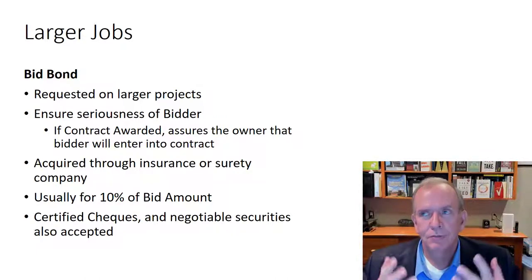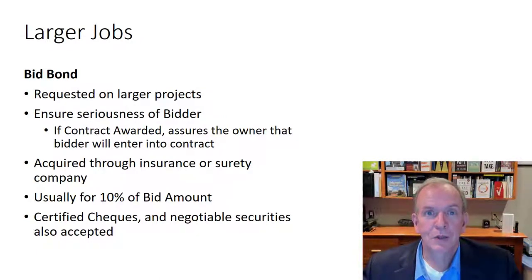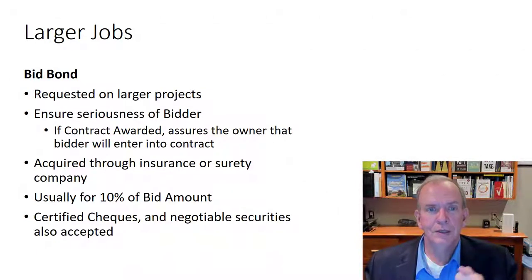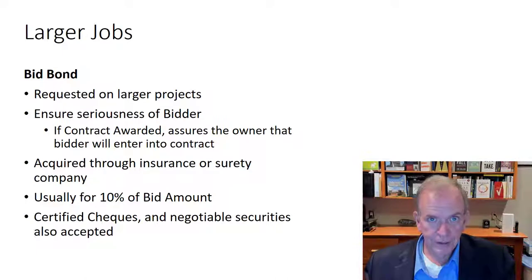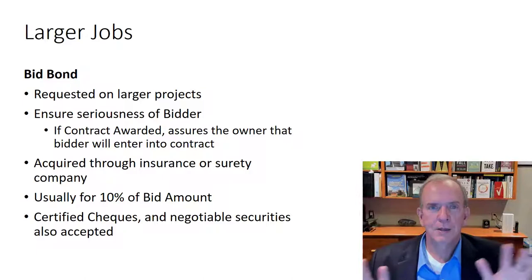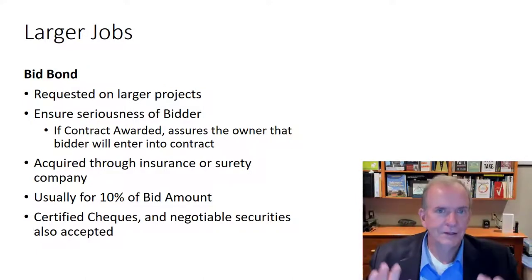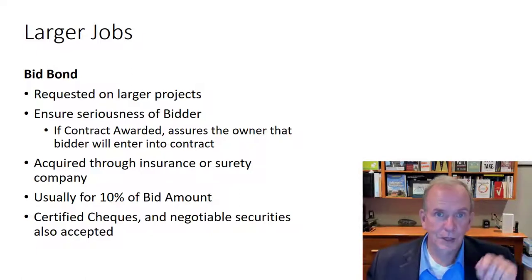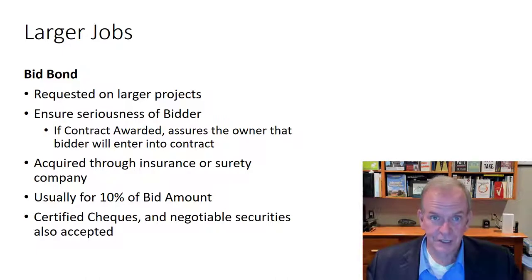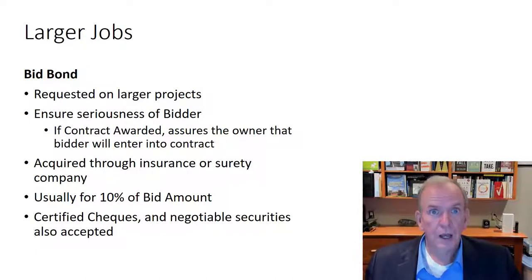There are different types of bonds. The bid bond — say it's a government project, they want a bid bond of ten percent. If they think it's a three million dollar project they want a three hundred thousand dollar bid bond, from a surety, saying that if your bid is accepted you're going to build this project. If you're that contractor who came in a million dollars cheaper, you can't just say you made a mistake and walk away — they're going to take your bid bond. The bonding company will come after you for that three hundred thousand dollars and you won't be able to bid on other projects again.